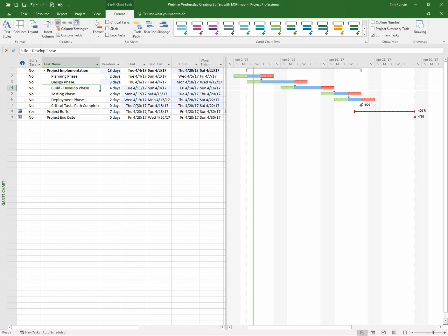So as long as you're not editing that hammock task in PWA, you can use the desktop tool to be fine with. The other element is, remember, I added this kind of end date target milestone. In this case, this would potentially break my critical path planning because I threw this activity out there. Now you notice here I didn't keep these directly within the summary task. I actually kind of created the buffer outside and the project end date.